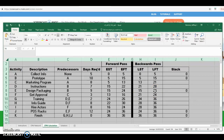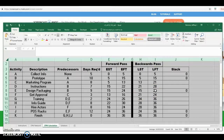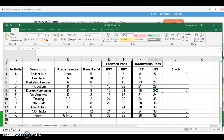Similarly for activity E — E is a predecessor for G and J. G starts on day 34 and J starts on day 24, so activity E must finish on day 24 and start on day 21 because of the three-day duration. For activity D — D is a predecessor for G and H — the earliest of the start times is day 28. So activity D must finish on day 28 and, because of the seven-day duration, will start on day 21.